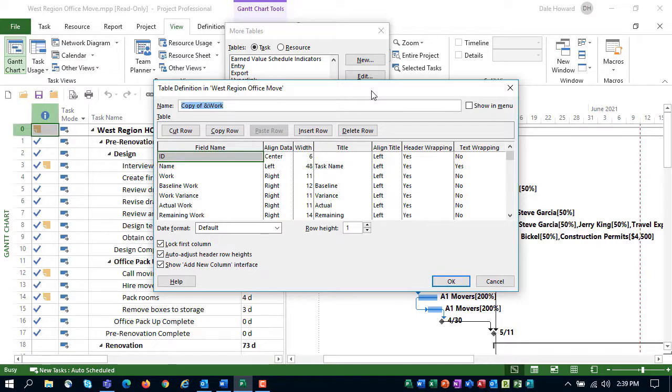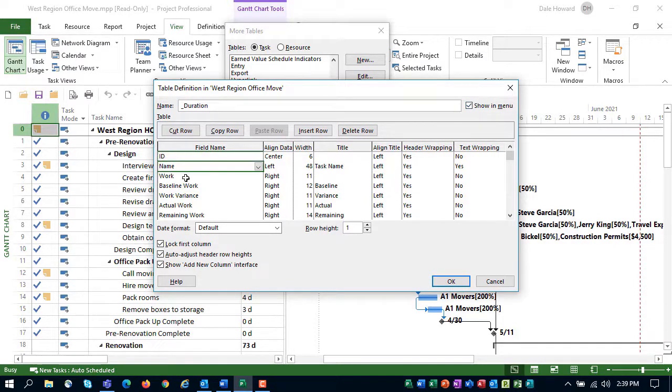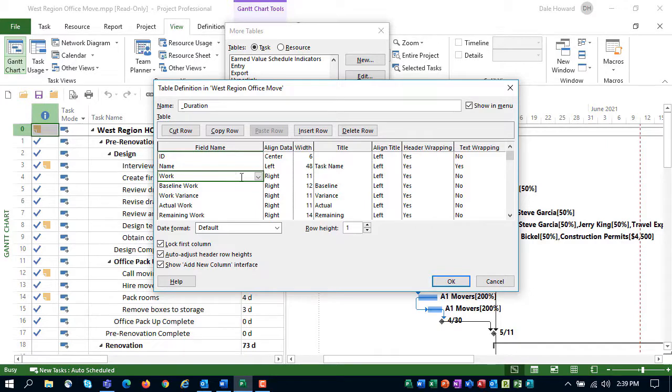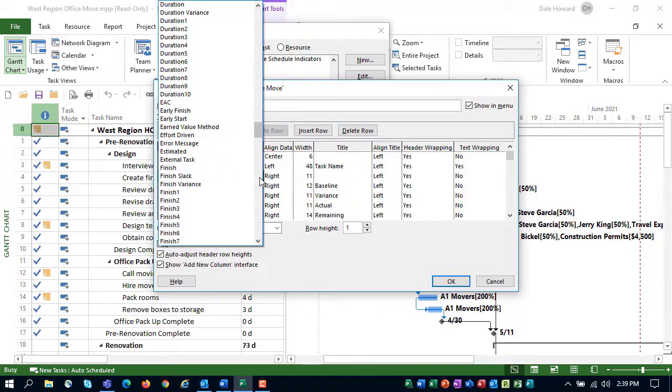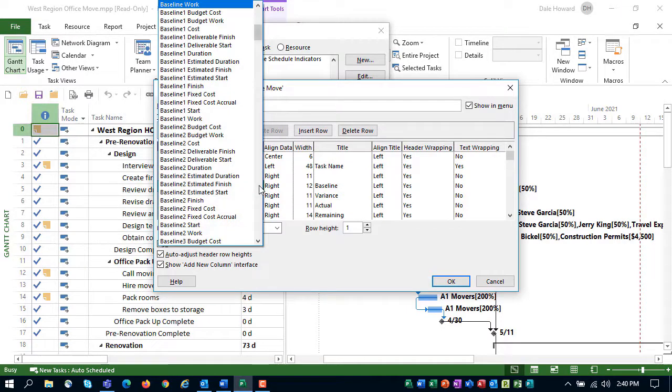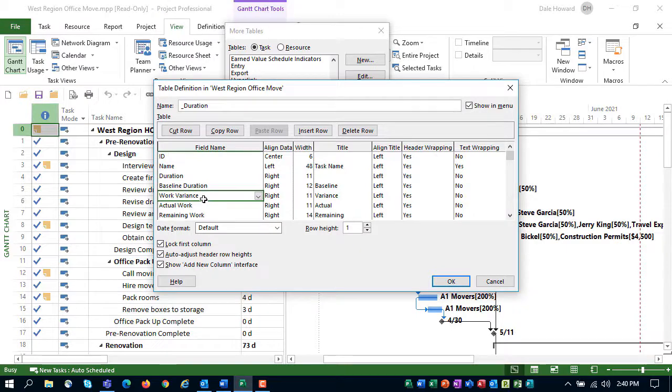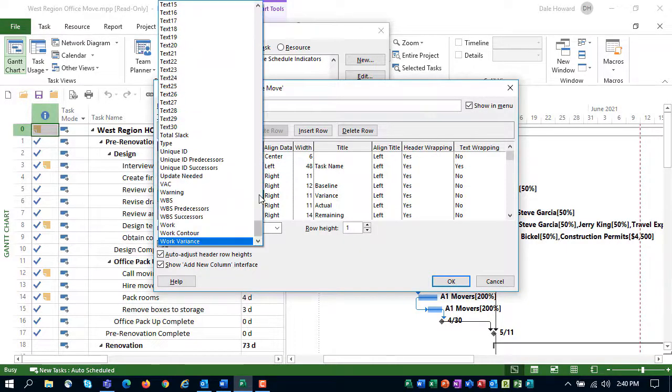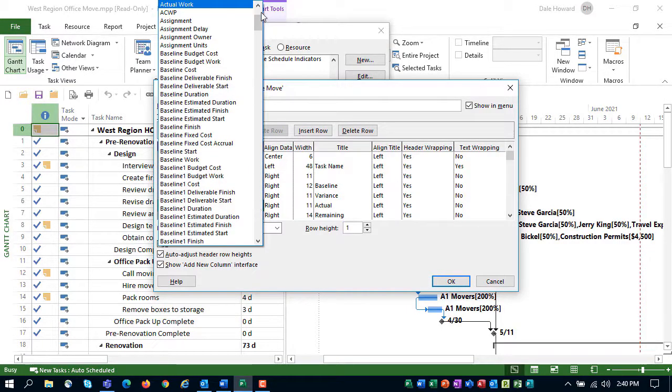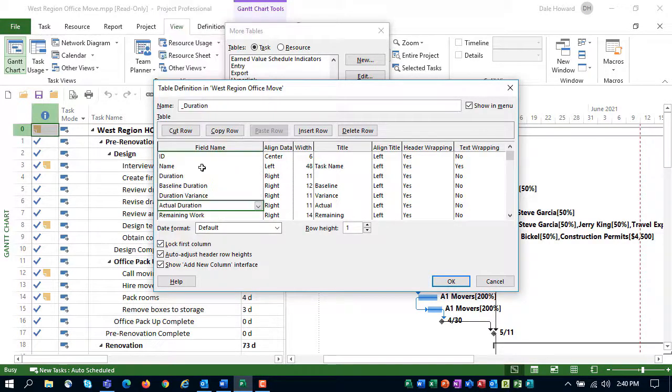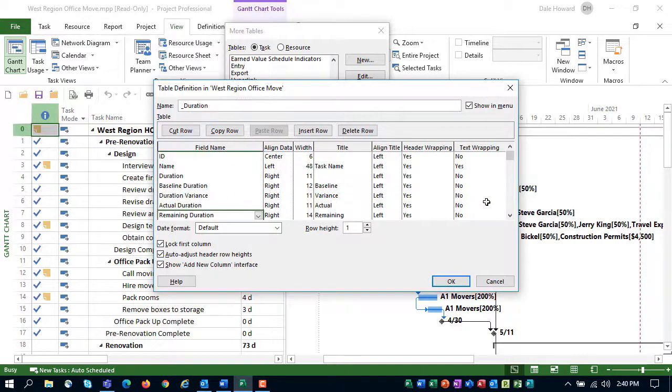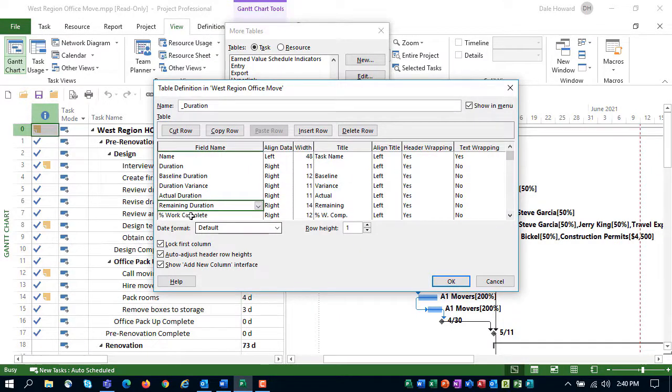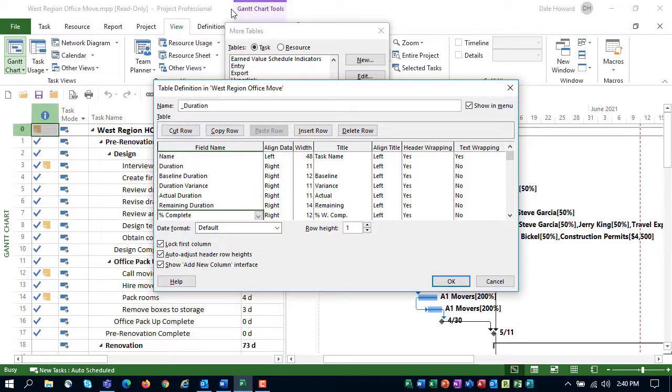In the name field, enter a name for this table, such as underscore duration, which will put it up at the top of the list because of the underscore character. Do select the show in menu checkbox. Then, for each of the work related columns that are displayed in this table, swap them with their duration related counterpart. Swap work for duration. Swap baseline work with baseline duration. Swap work variance with duration variance. Swap actual work with actual duration. Swap remaining work with remaining duration. And then finally, swap percent work complete with its duration related counterpart percent complete.